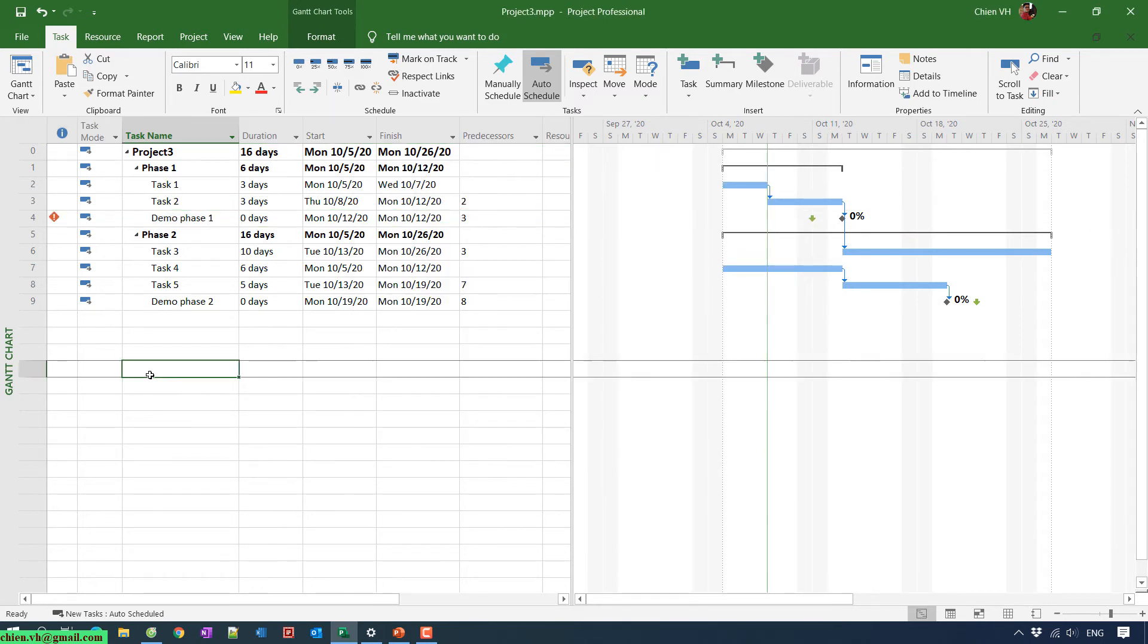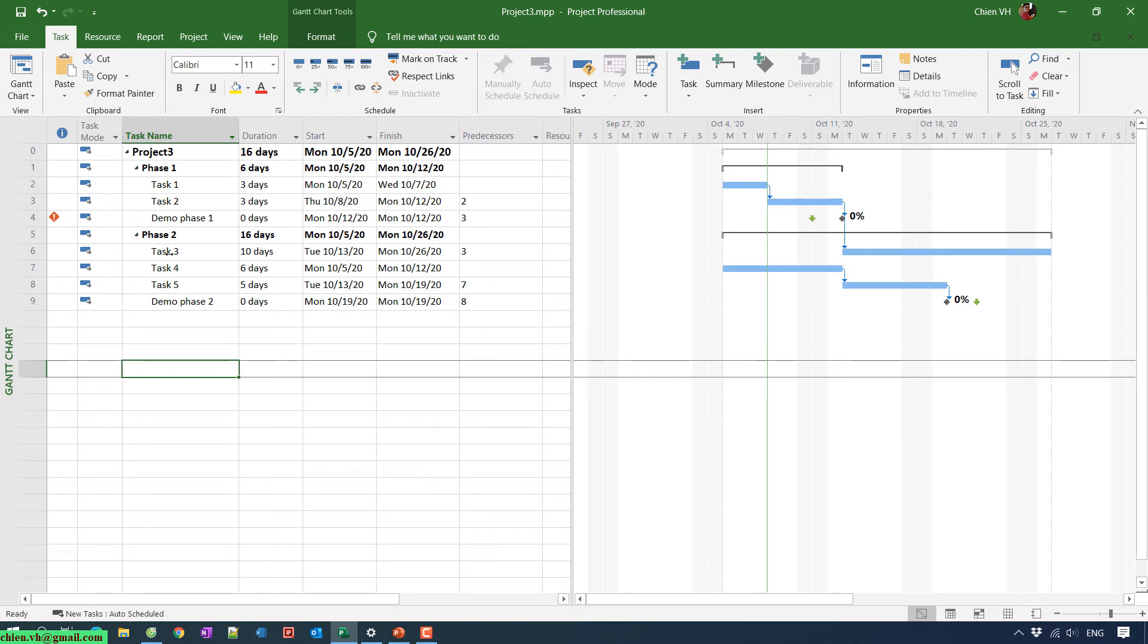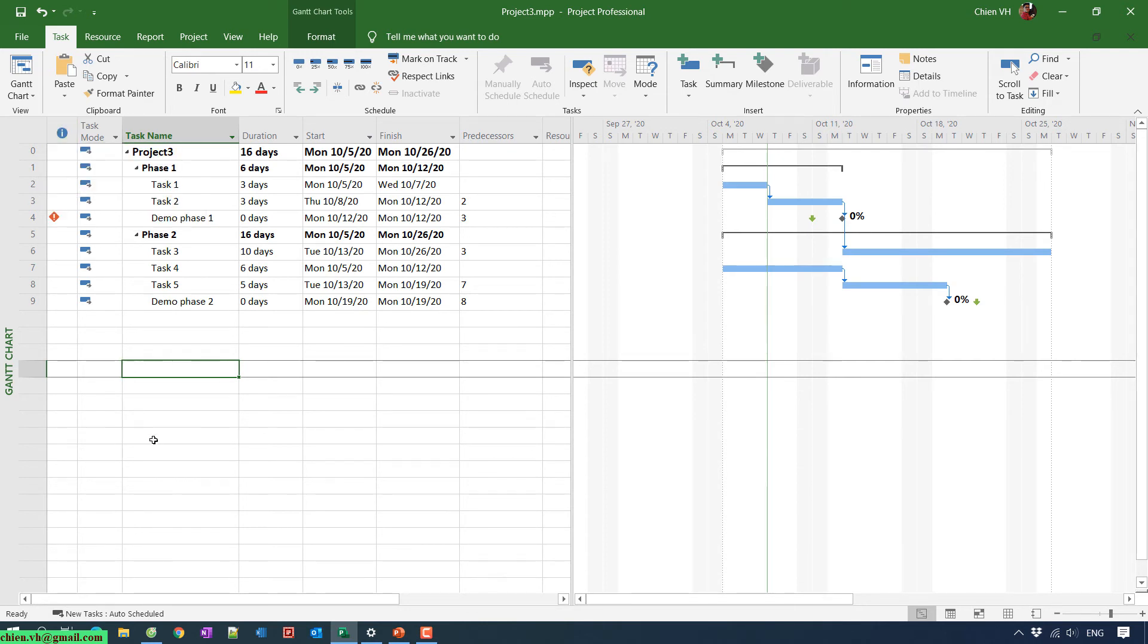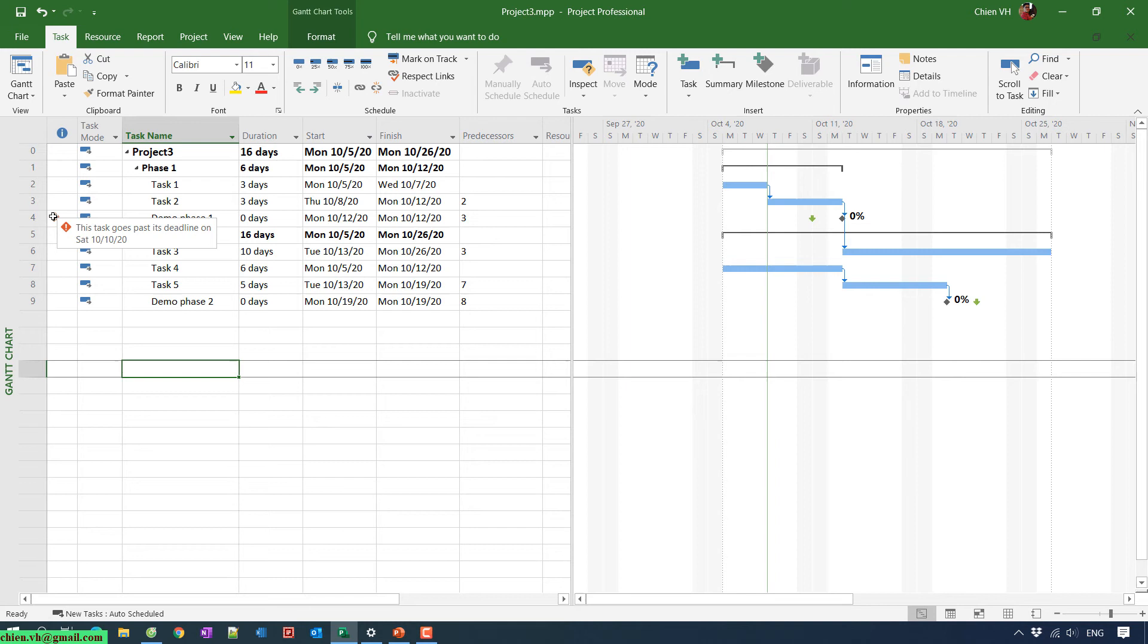So you see here after I moved the deadline of the Demo Phase 1 from the 14th to the 10th October, you see here that in the indicator column, the first column, it displays a red icon here. It says that this task will pass its deadline on Saturday, 10th October.